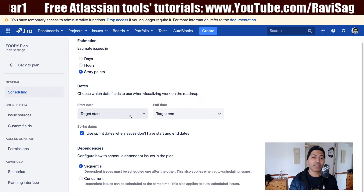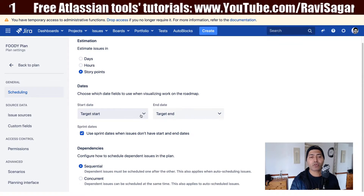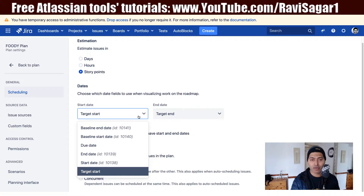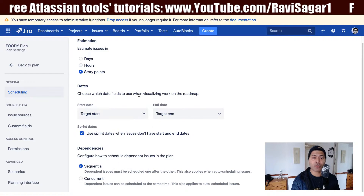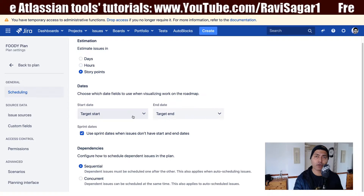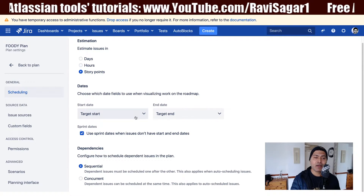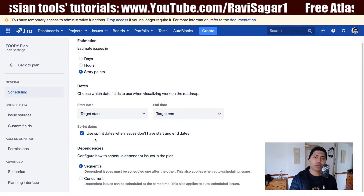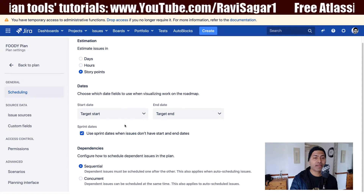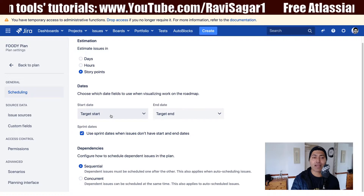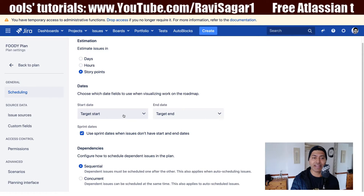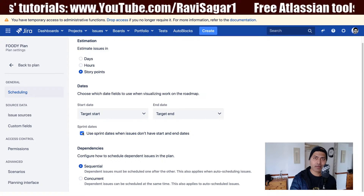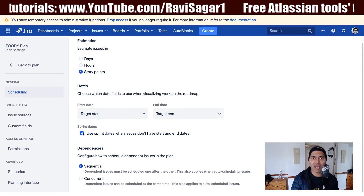You also have the option to define the start date and end date. Maybe you have some other date that you want to use in your plan, and this will be useful when you are working on the roadmap. There is also a configuration like use sprint dates. Many issues don't have a start and end date, so the roadmap will rely on the dates configured here. But if the dates are not there, you have the option to select sprint dates, which ensures you will have something in the roadmap.